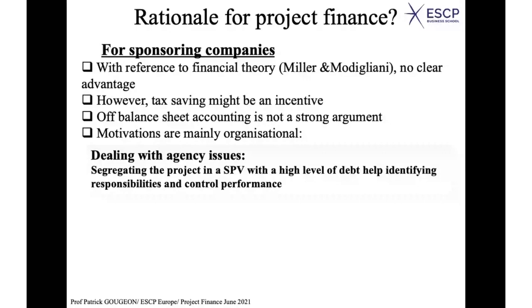It means that the cash flows generated by the new power plant will contribute to the general cash flow of PetroVietnam. And you see, in this case, it may be very difficult to identify the performance of this new project, okay? Why? Because you have different costs which are not easy to allocate either to the project or to the rest of the company. You don't know whether a person who is working only part of his time for the project, whether he should be paid by another service.